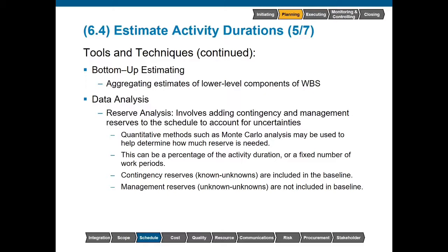Under data analysis, we see our reserve analysis. We may want to involve reserves within our schedule to account for risk events that may or may not occur. So how do we determine how much to put in? We can use quantitative methods. So we can do a Monte Carlo simulation, which is a random iterative computer model that will tell us within a roundabout range how much reserve we need.